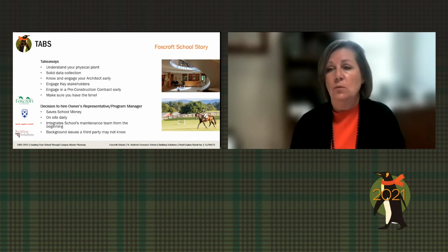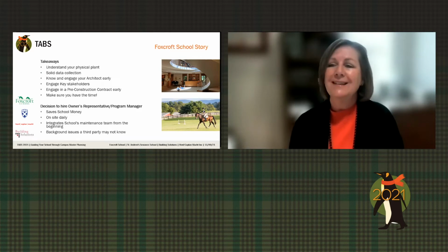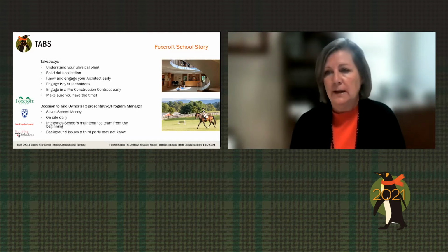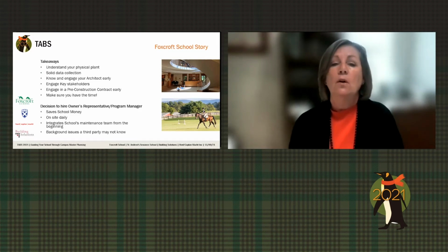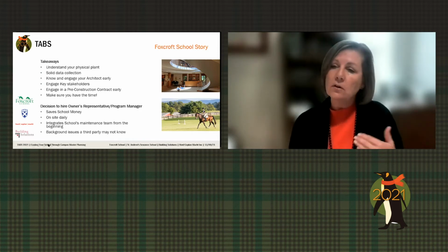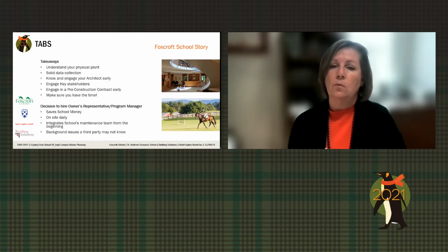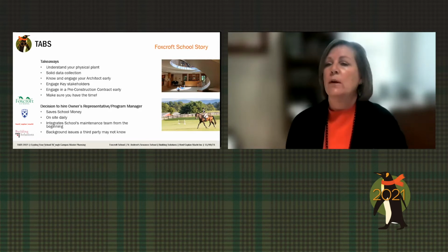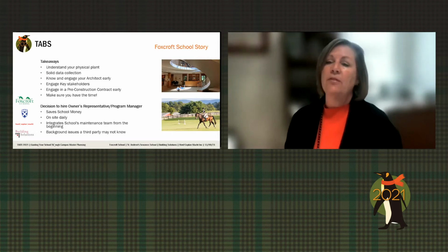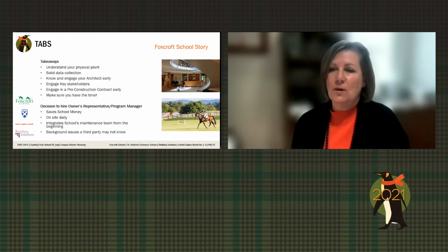Engage in pre-construction with a contractor. If you're lucky enough to find a contractor you are comfortable with that knows your campus, engage them early. Spend that little extra money so that they can help you say, if you do this, this is going to happen, or you're going to incur this for the infrastructure. Things of that nature. The earlier you start, you can think about the whole process so that you're not throwing good money after bad. You're thinking about the end game, and make sure you have time.